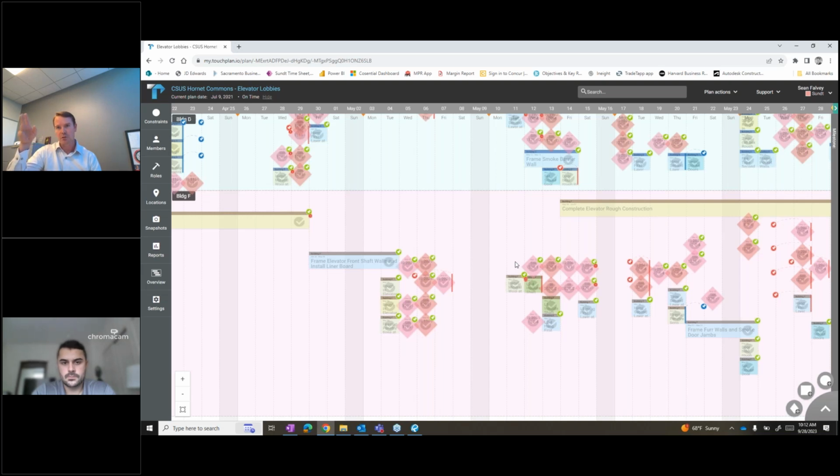And these inspections were on specific days. We didn't have the ability to have an inspector on site full time. So we had to hit our inspection on a Tuesday. Otherwise, that work might then delay till the next Tuesday, and we'd lose an entire week on the project. So this is extremely detailed because of that whole process. And what Touchplan enables us to do was really communicate back and forth with the trades quickly about where they needed to be and what they needed to do, because they saw just what we're seeing right here. They saw that, hey, there's an inspection on that Wednesday. I've got to make sure I get all this stuff done Tuesday.